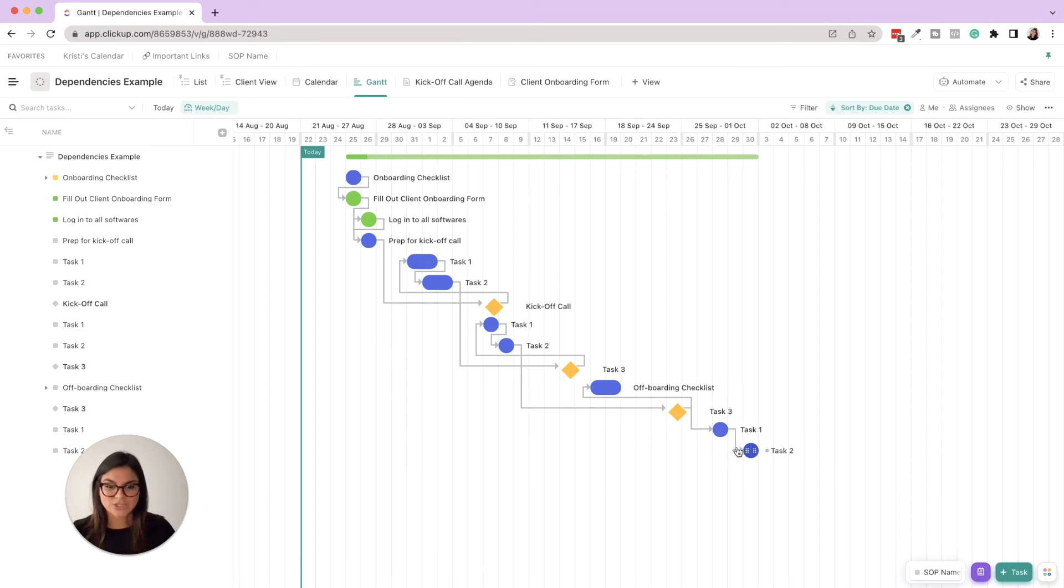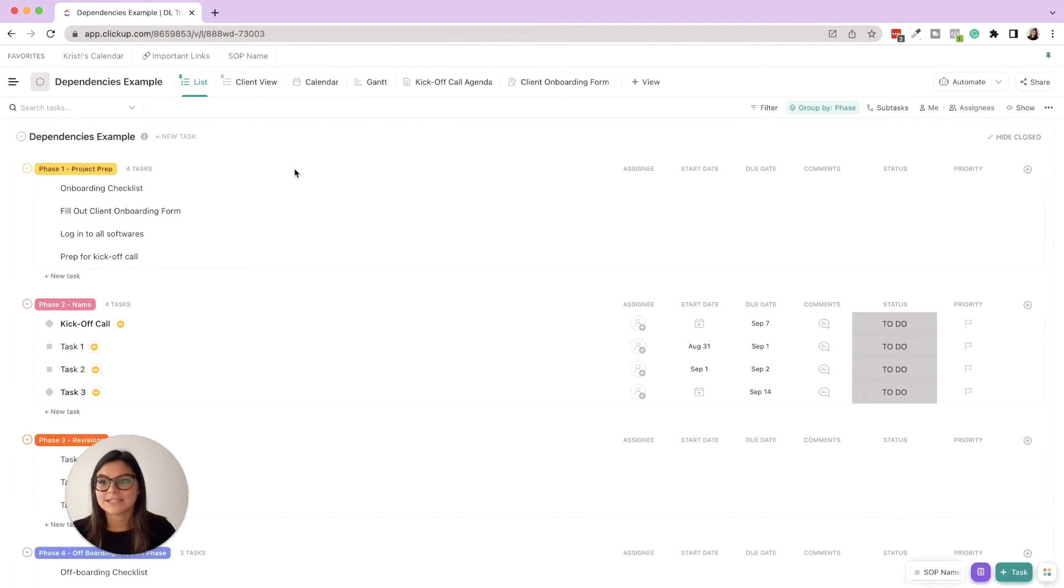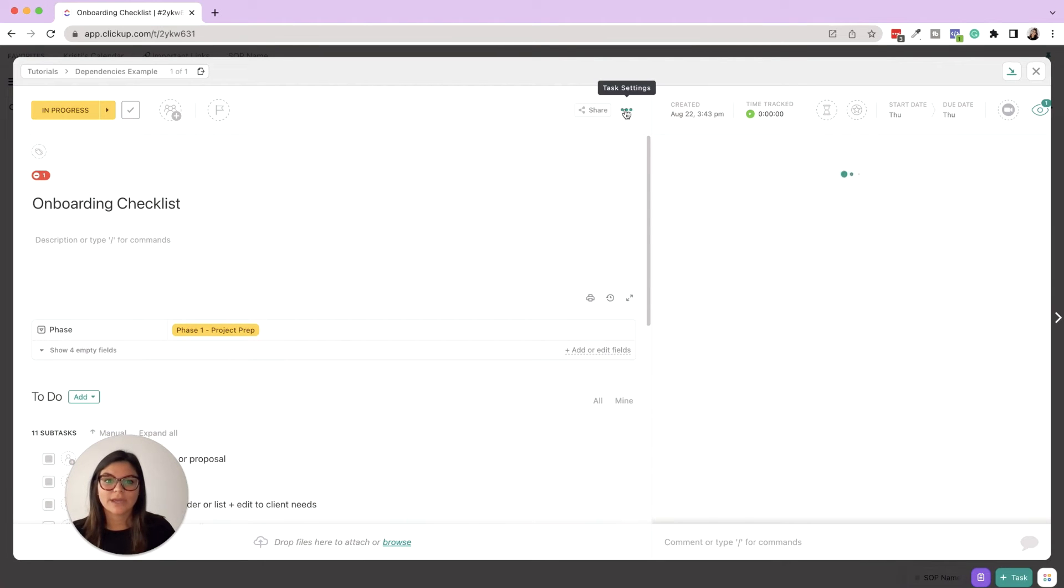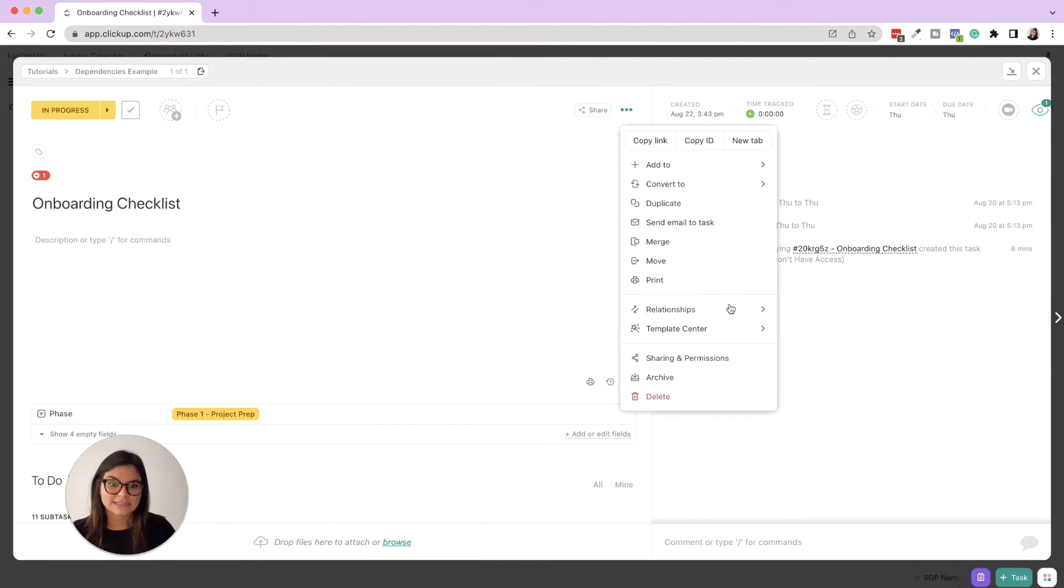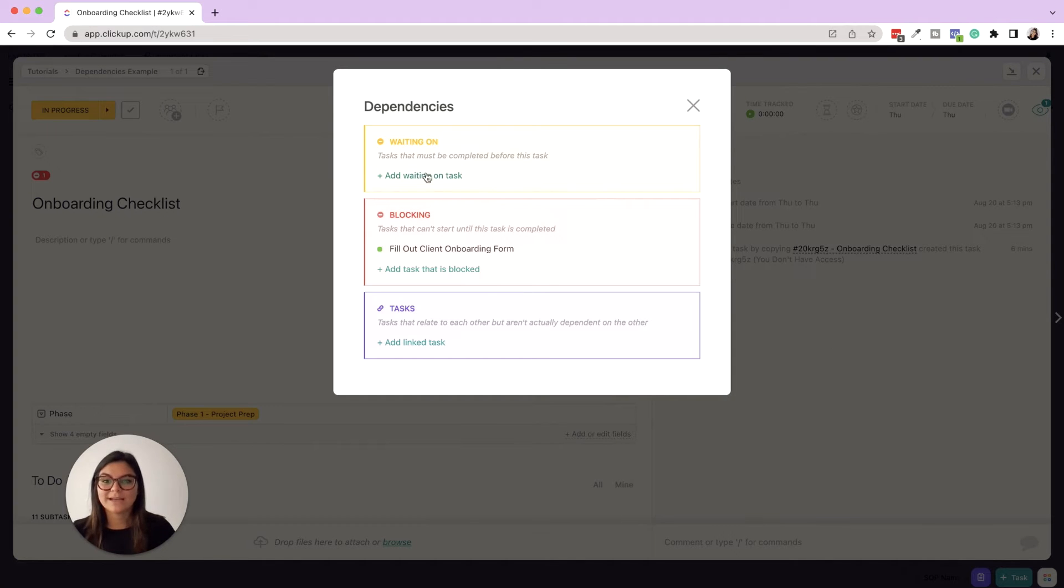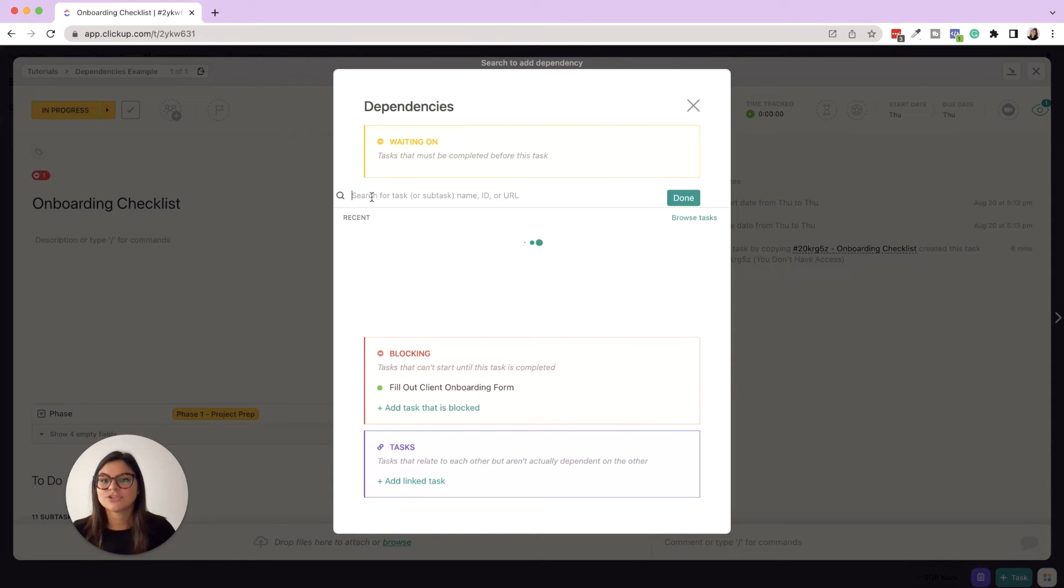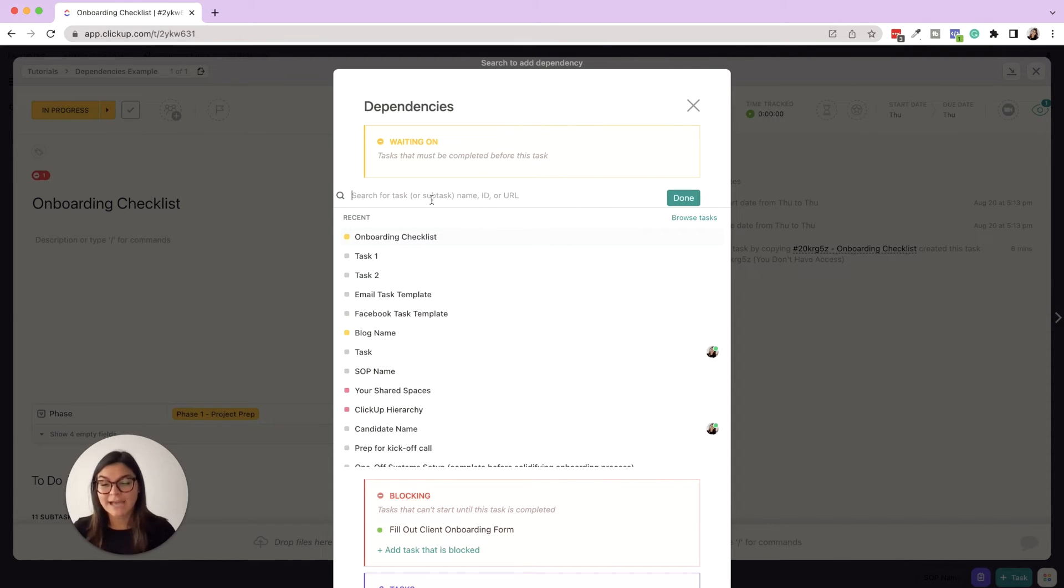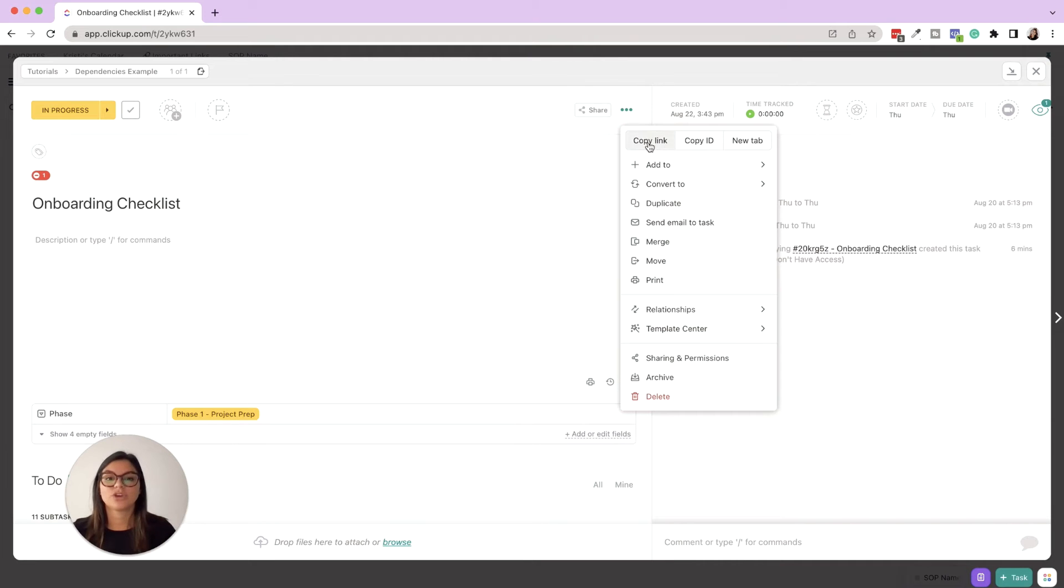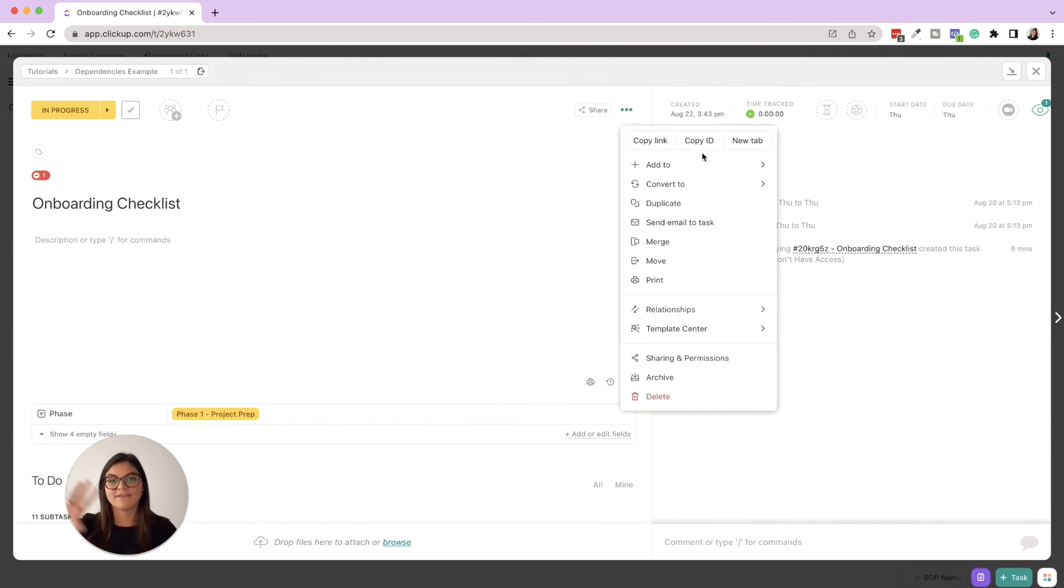The other way is you can click into the task itself, go into task settings, relationships, and then dependency. So now you could add waiting on tasks, blocking tasks, and then just regular linked tasks. And that's where you can come in here and just put in either search for the task. I personally find that having the URL or ID of the task is going to be the quickest way to link those, and then you can grab those from copy link, copy ID.